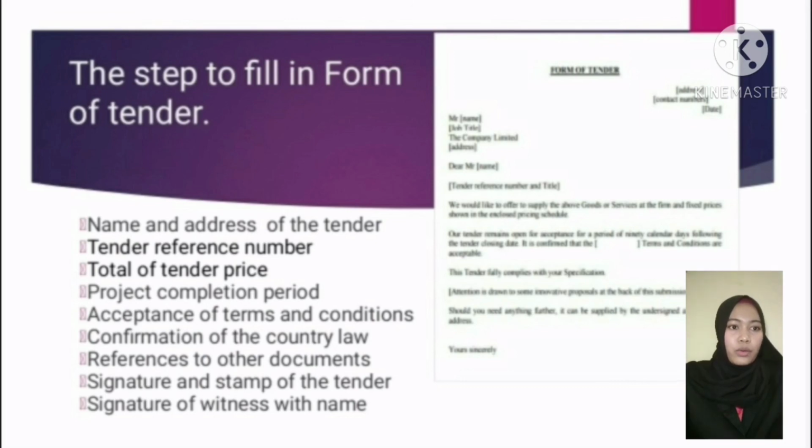Actually, I would like to explain about the steps to fill in the form of tender. In the form, we must have a name, date, and address of the tenderer. Secondly, we should have the tender reference number and title of the tender.